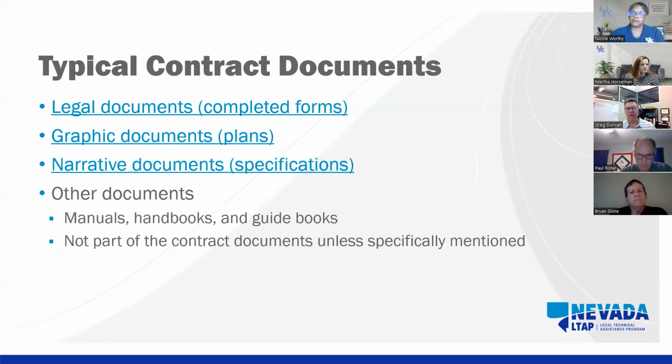remain within budget. There may be a contingency budget established in some contracts that provide for some unforeseen work that has to be done through that contingency. And yes, Brian, there is an emphasis on safety, and Dirk, absolutely correct. There is a contract completion date that the agency expects the contractor to meet.